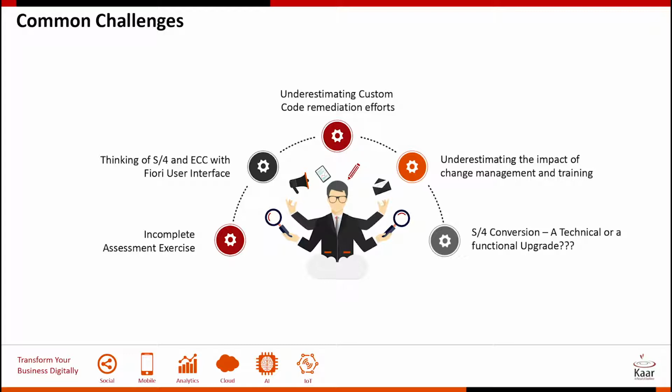And then underestimating the custom code remediation efforts. The first thing you'd want to do is, when you look at the ABAP code, you might have developed 10,000 ABAP objects. You don't have to fix all those. So get your statistics enabled to figure out how many of these are actually used. That will help you prioritize what needs to be remediated, because it's futile to remediate an object that you've never used. If you've done your analysis and preparation well enough, then the custom code remediation efforts are not as complex.